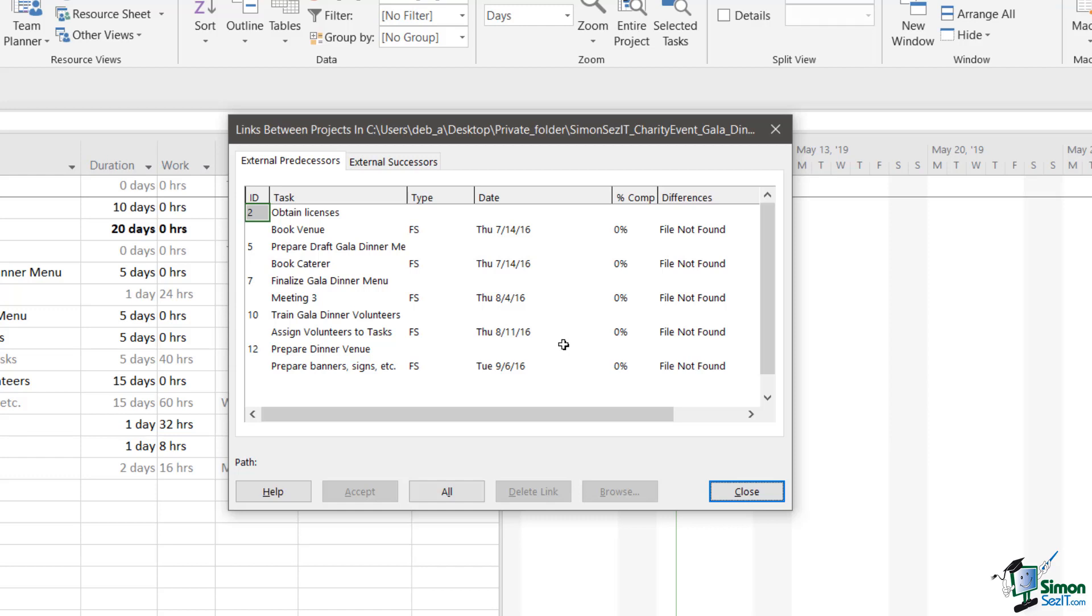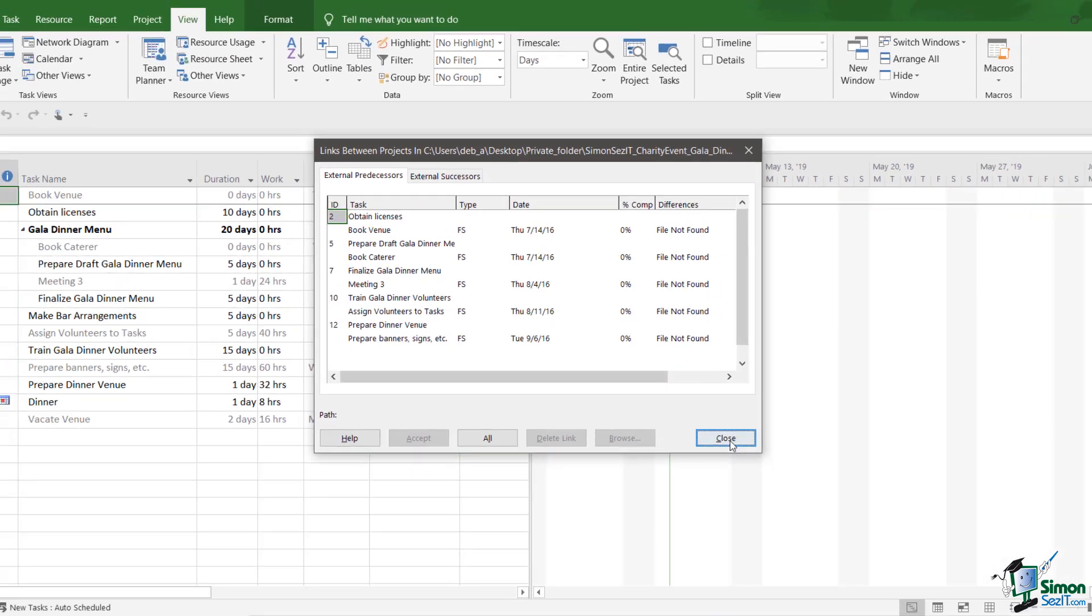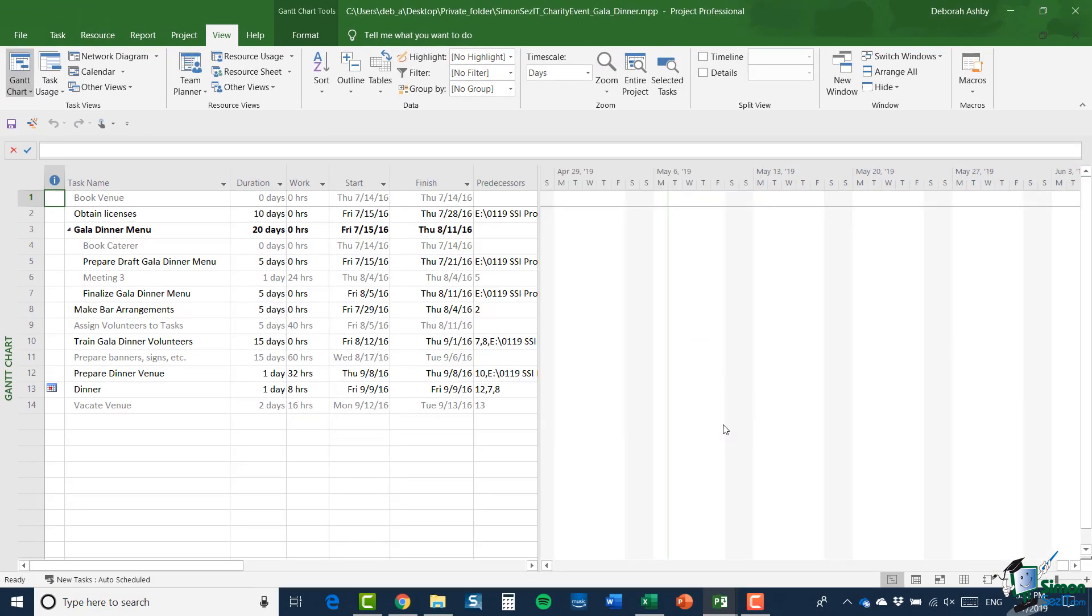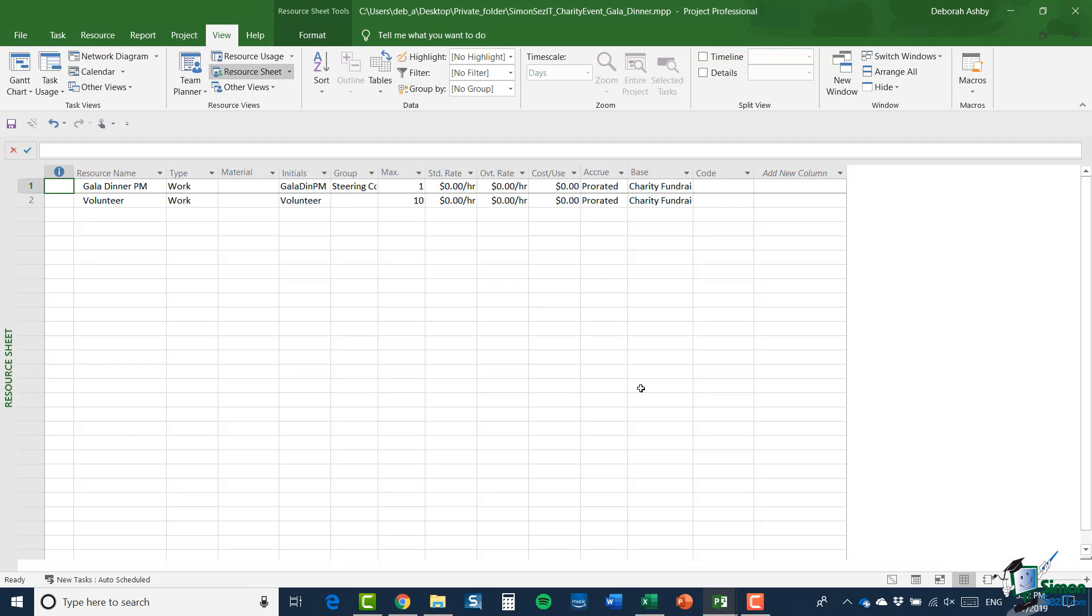And what you'll see here is that we get a warning about links that can't be made because this project is no longer in the shared location. So, what I'm going to do at the moment is just close and go to the resource sheet and take a look at that. So, on the resource sheet you now have just two resources and the two resources are the two specific resources that are used in the gala dinner project. So, gala dinner project manager and volunteer. And what happens in this situation is that project 2019 creates a sort of temporary working resource sheet and only includes the resources that it knows about which of course are the resources that are used in this project. It's unaware of the other resources because it can't see the shared resource pool. Now, as far as project 2019 is concerned, these are at the moment local resources in a local resource sheet.